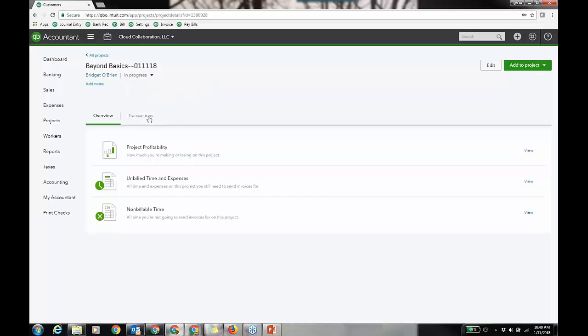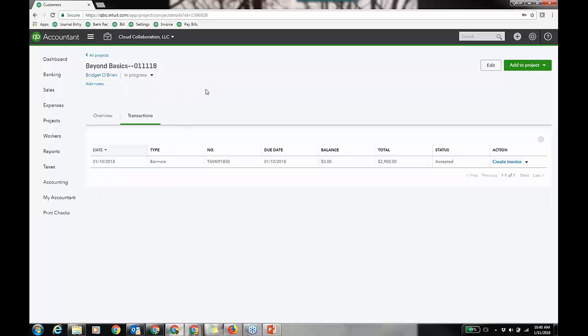So already I have an estimate. You start with that. So the project center, which is really nice, tracks the transactions of the project as well as I can add transactions to it. And that's what we're going to do, and we're going to look at a P&L report and even a budget report and move on to class location. I know you've probably heard, well, maybe I'll use class tracking for job costing. I still prefer either the sub-customer or project because you get better detail reporting.